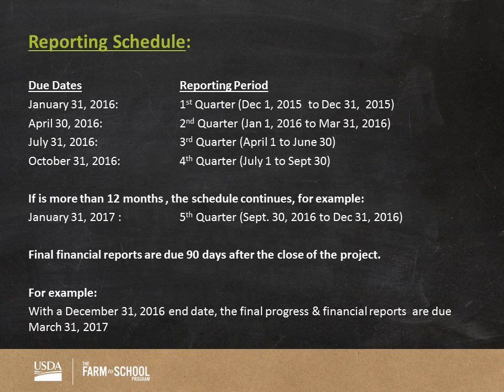And one thing to add into that, and I'm sure we'll get into it once we have the gathering this April, is that no expenses may be incurred after your end date. So all of your expenses must be obligated prior to whatever your end date is. That means that you all would need to anticipate what your expenses would be for closeout. So if your grant ends December 31st, 2016, and you have 90 days, that means that someone's going to be putting in some work in January, February, and part of March into paying your final invoices, doing your evaluation report, and that sort of thing.